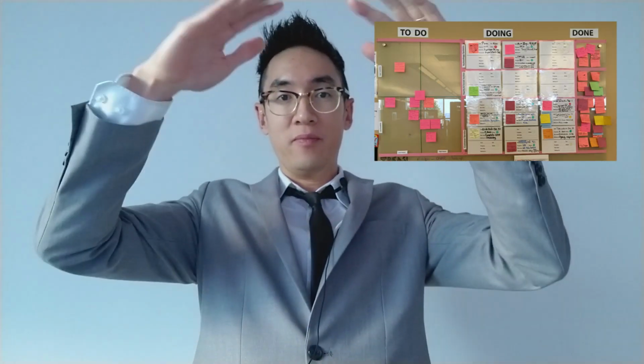The last type of tool that I can recommend is a physical board. The physical board is very convenient because you can add your action directly in your Kanban board if you work in Kanban inside your team, or add your task into a sprint if you work in Scrum Agile in your team. It's very convenient because you don't have to log in on your laptop to update your task. You just have to stand up, go to the board, and move your task. But it's not convenient if you have offshore teams, because a physical board can only be seen by the people in the office.